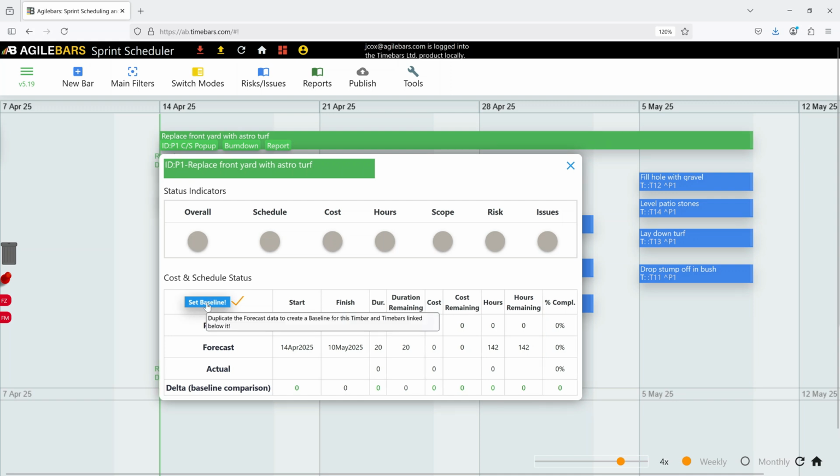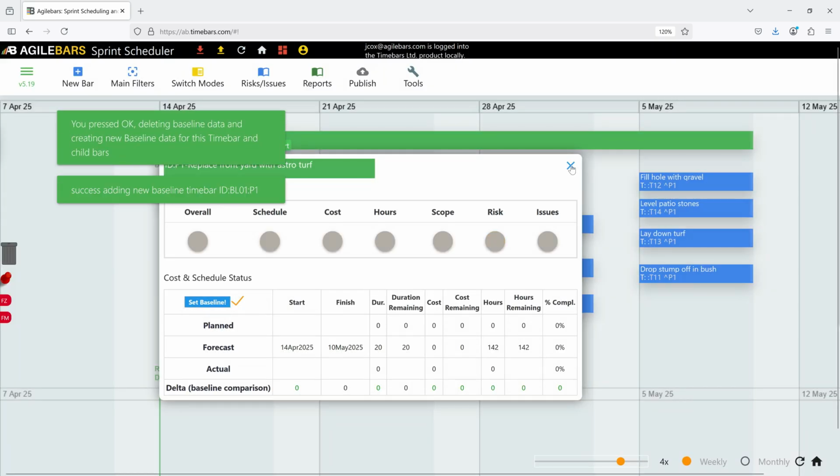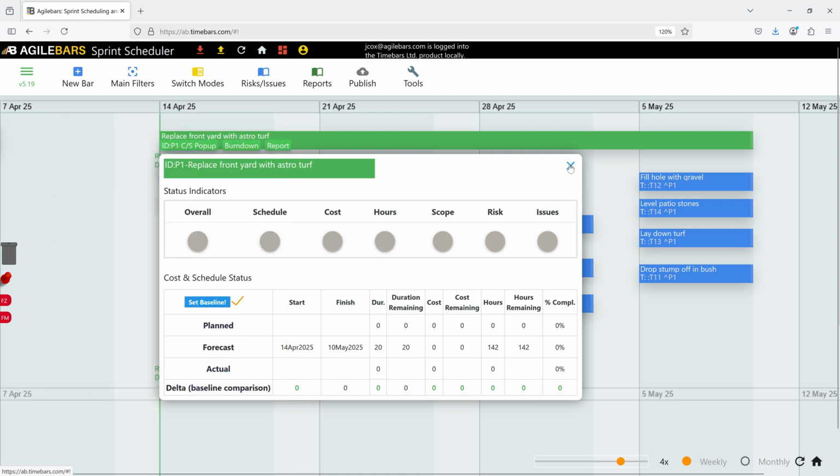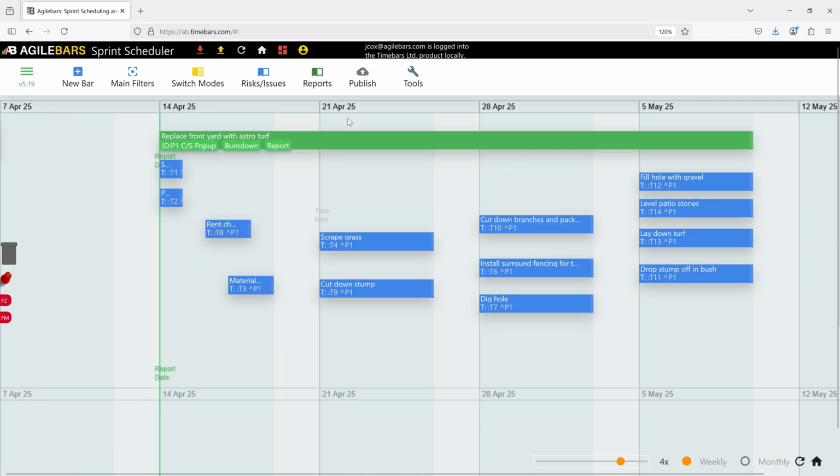Sprint progress as a percentage, that variance analysis comparing to baselines, and even a forecast completion date based on the current trend. Is the current pace going to get us there on time? So it's trying to provide not just a rearview mirror, but also a bit of a forward look based on real data. That seems to be the goal. Okay, makes sense. Final step, step 5.